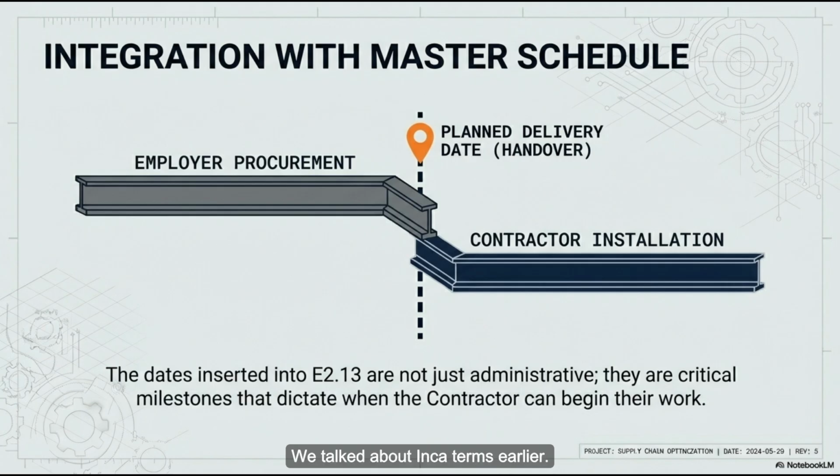We talked about Incoterms earlier. Importing a free issue transformer into the European Union is a paperwork headache, sure. But importing that exact same transformer into, say, a highly remote region of Brazil or a very strict customs regime in Asia, that is a waking nightmare. Because the entire definition of duty paid changes completely depending on local tax law. It does. And the time it takes to actually clear the port changes drastically.